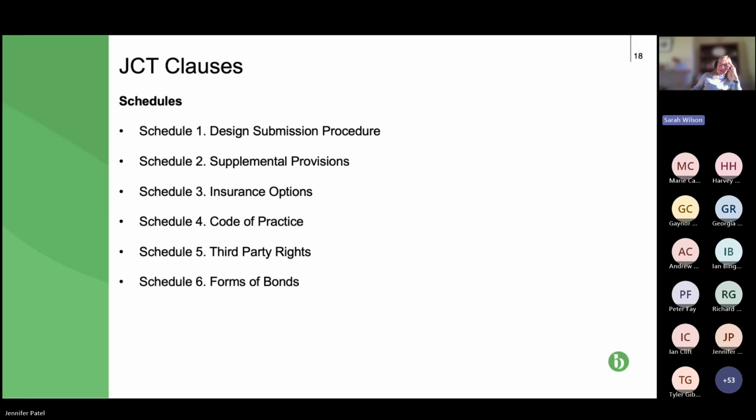It was done on the basis that the paying party would engage the consultants to carry out the design and then separately engage the contractor to carry out the work. So the paying party didn't have that one-stop shop, where I pay the contractor and the contractor pays all the other parties. If I have a dispute or a defect, I pursue the contractor and the contractor has to claw back monies from any of the other parties, consultants or subcontractors, who the contractor thinks will be liable for those issues.